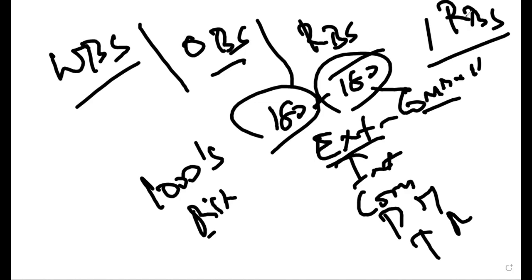It will take a lot of time, a lot of effort, a lot of resources, and money also is wasted there. So the 80 risk comes from poor communication. If you're able to categorize this one, you are able to come up with a generic response. One single generic response will make you fix the poor communication. Right or wrong? Correct.